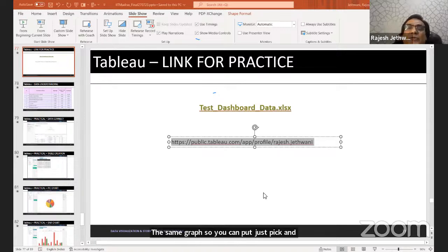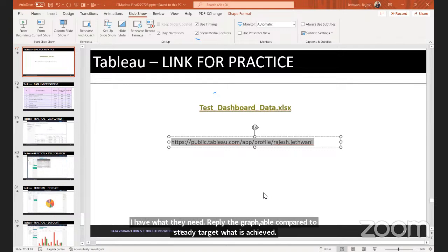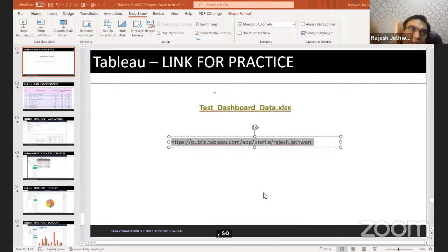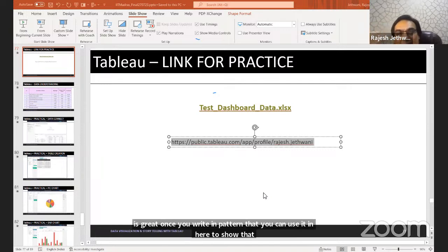See, the advantage of Python is that it gives you further analysis whenever you are working with queries. But what Tableau is doing is simply this: suppose I have prepared a graph for a comparative study of target versus achieved. But supposing you want to use machine learning or something like Python: my target date was this, what will be the probable target date if we are not achieving the progress? What is my completion date? How much is it going to be shifted? That script, once you write it in Python, you can use here to show the interpolation of how your completion dates are shifting.